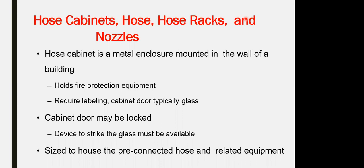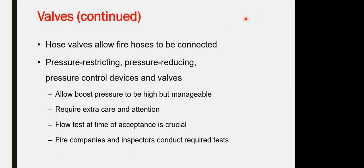So all of this documentation, procedures, certificates and test results, you have to collect for the submission itself. What does it mean? We are contractors. When I'm working on site, whatever material I'm procuring for NAFCO or for other companies, I assure that the material is certified and accepted by the civil defense. Number one, providing data sheets. You prepare your submittal. I'm targeting the submission for the civil defense inspection after 1 year. Starting from today, I'm compiling and collecting all the documentation one by one: data sheets, test certificates from the civil defense, etc.